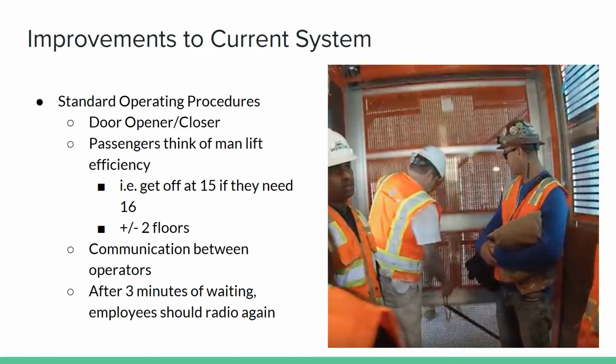After that, another part of the SOP would be communication between operators. So for example, after someone radios for a man lift, the operator who is going to get them and who is in a good position to go pick them up can speak into the radio to let everyone know they're coming, just to avoid 2 operators going to the same stop to get the same passenger, which would waste even more time. And then another thing we added to the SOP was after about 3 minutes of waiting, employees should radio again.